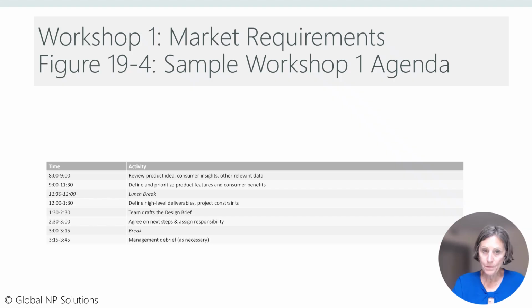Workshop 1 participants. It is important to limit the number of participants in the Lean New Product Development Workshop to those who are participating and contributing to the technical decisions of the project. Moreover, smaller groups can make decisions more quickly than larger ones. In Chapter 21, we describe a situation in which the workshop was held virtually and open to a very large group of personnel. This led to a lack of decisions, and the project leaders were forced to hold several follow-up meetings to try to converge on solutions. Extra meetings introduce churn and defeat the purpose of working in lean new product development.